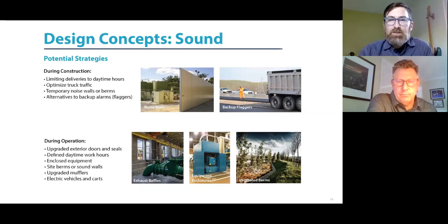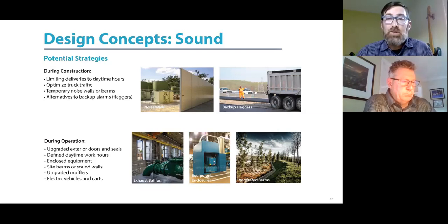Yeah, we know that edge along Dodge Park Boulevard that drops off is a seismically sensitive zone, and there is a buffer that we need to abide by. There's a setback, so we want to make sure we don't put anything that's going to destabilize the soil or cause any extra erosion.